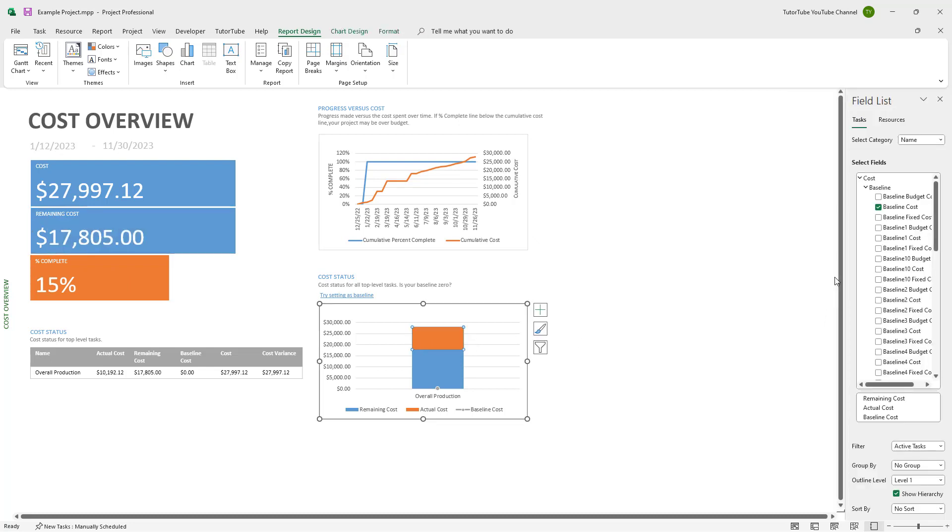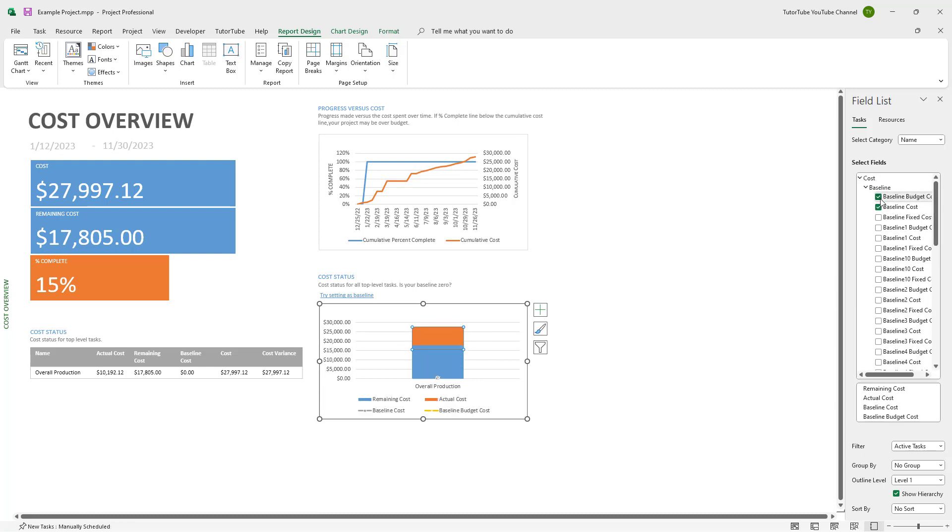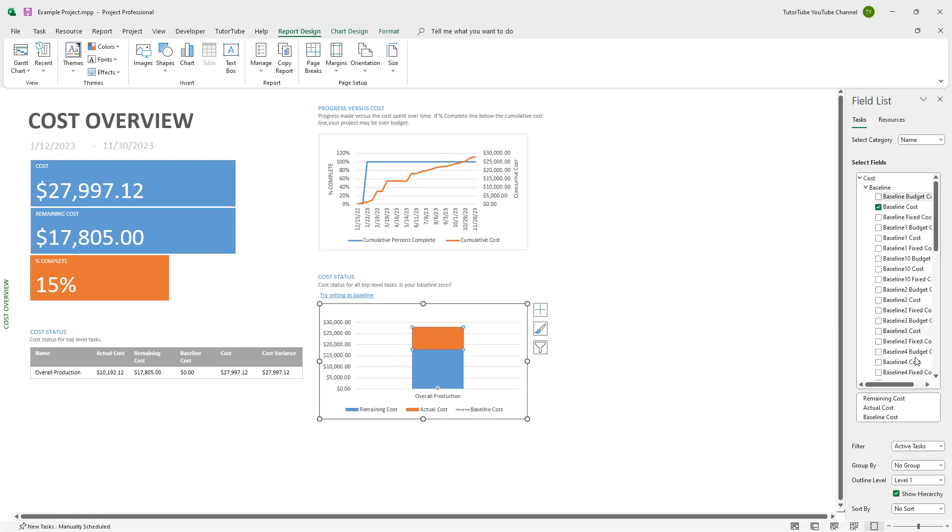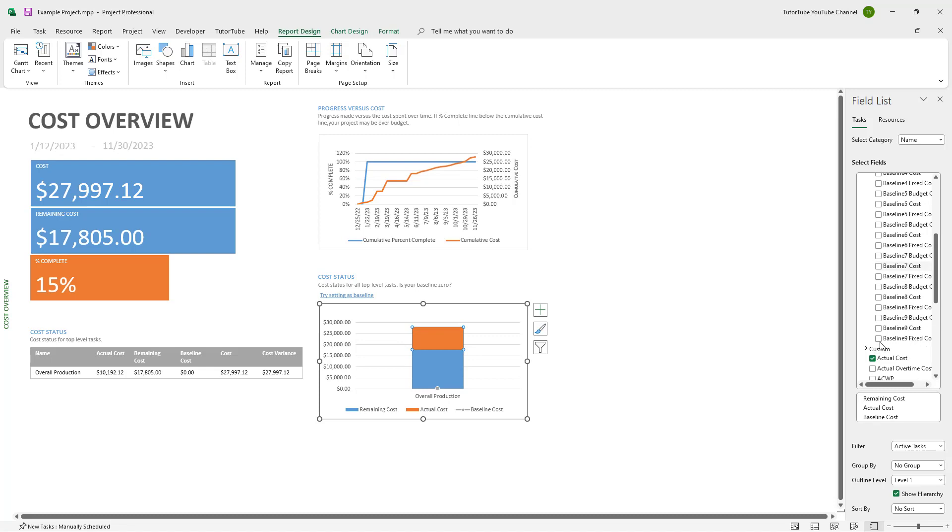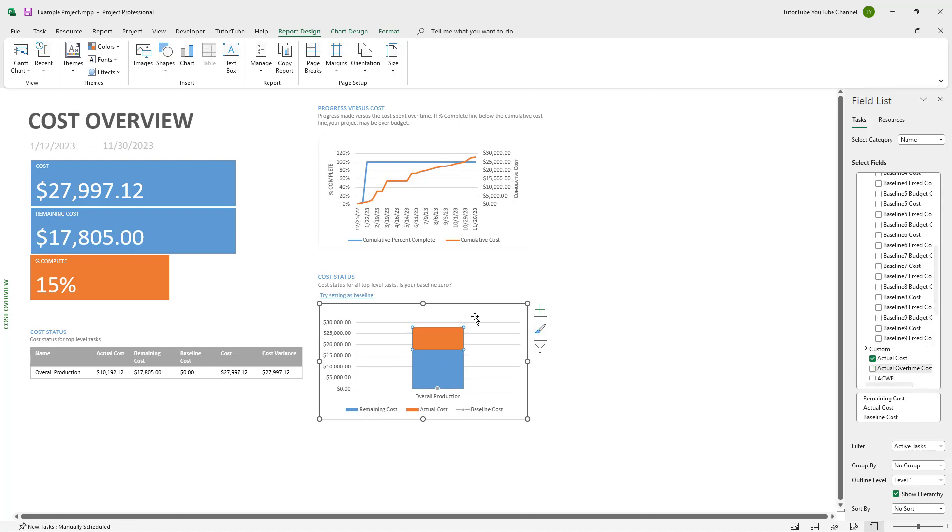On the right hand side you can see there's the baseline cost, there's the baseline budget, and you can enable and disable different options here like the actual overtime cost and so forth.